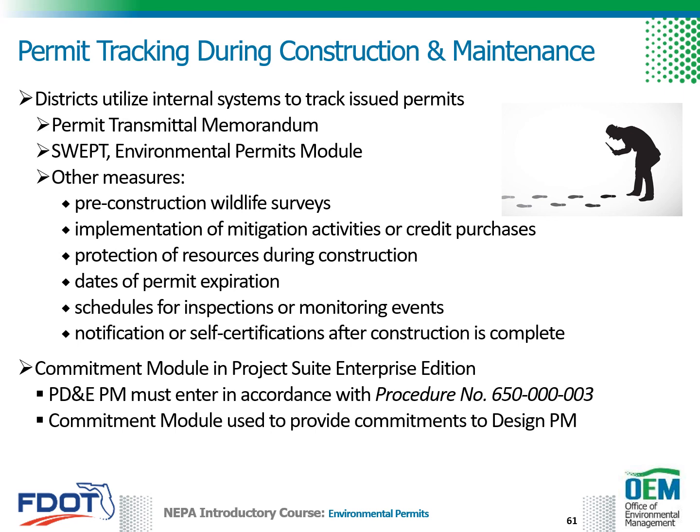A commitment module in Project Suite Enterprise Edition has been created to document, transmit, and track all commitments established as a result of the PD&E study and/or agency coordination. The PD&E project manager must enter all commitments into the commitment module in accordance with FDOT's project commitment tracking procedure. The commitment module will then be used to transfer these commitments to the design project manager for future tracking.